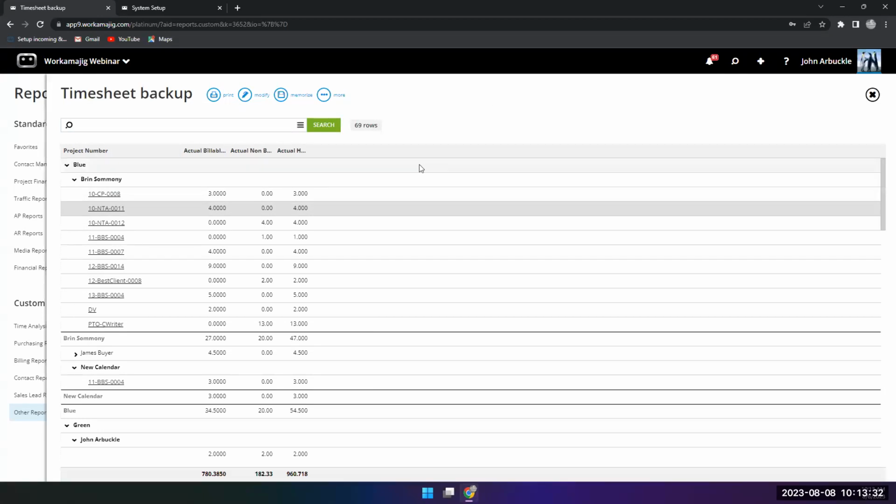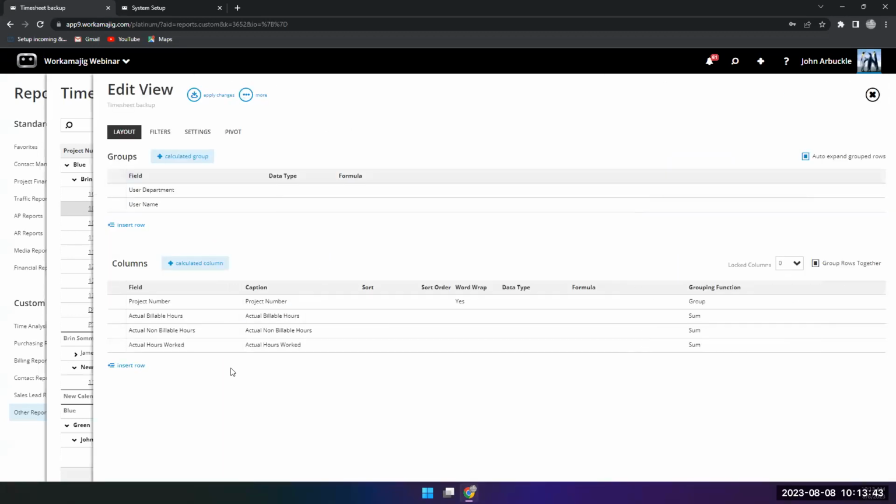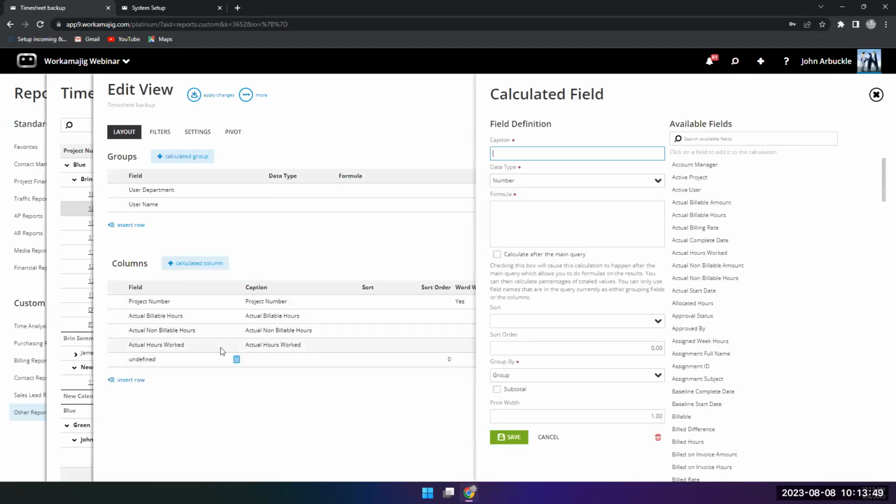All right. So now on reports, because we can do this kind of extra little data, I can roll things up. There may be some other tricks I put in. So again, we still have that standard calculated column. And the most typical, I would say, is, what's the percent perhaps of actual hours versus billable hours? Out of how many hours worked, how much of it was billable.